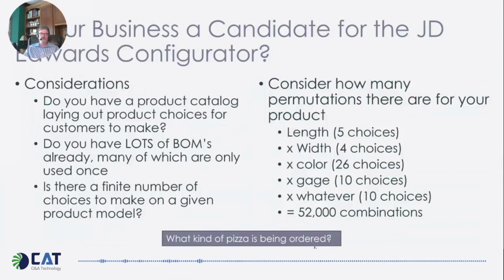Medeco's story is they knew they had 500,000 possible combinations, so they didn't set up the bills of material or even create the items, because it would take too long to create 500,000 parts with 500,000 bills and 500,000 routings. That's why they were creating them as orders were coming in. They knew all the possibilities; they just didn't have the time to set them up. And in 9 months, we set up the Configurator enough to cover 70% of their order taking.